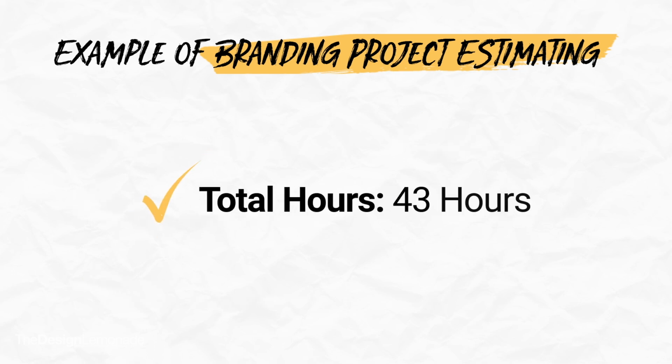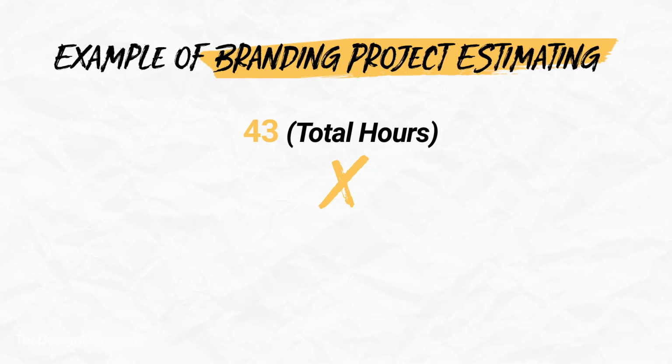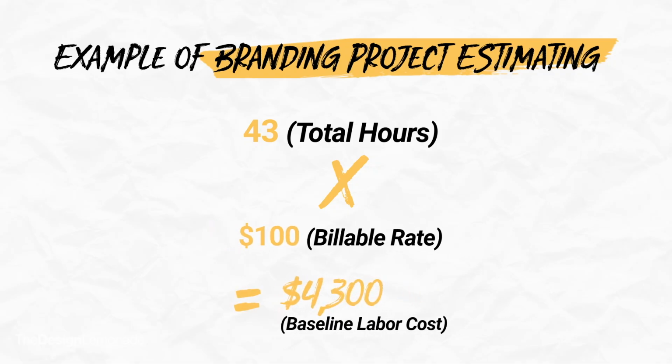Total hours = 43. 43 hours x $100/hour = $4,300 baseline labor cost.